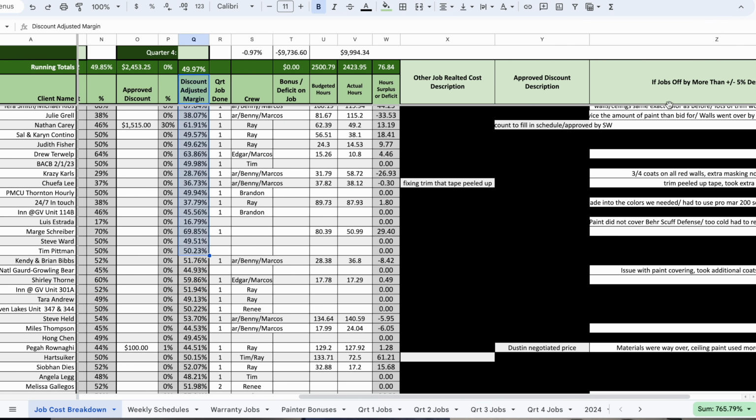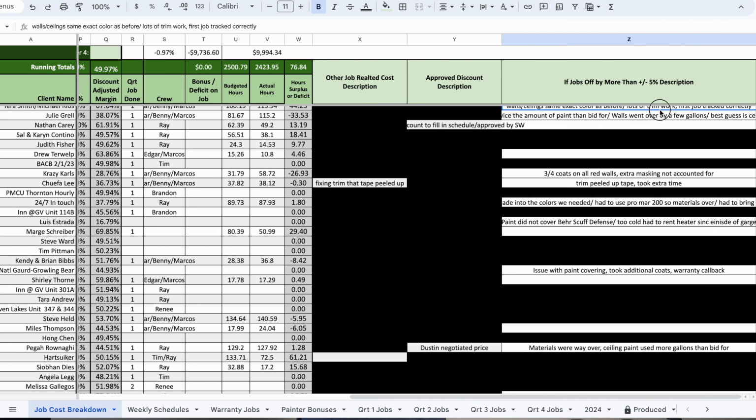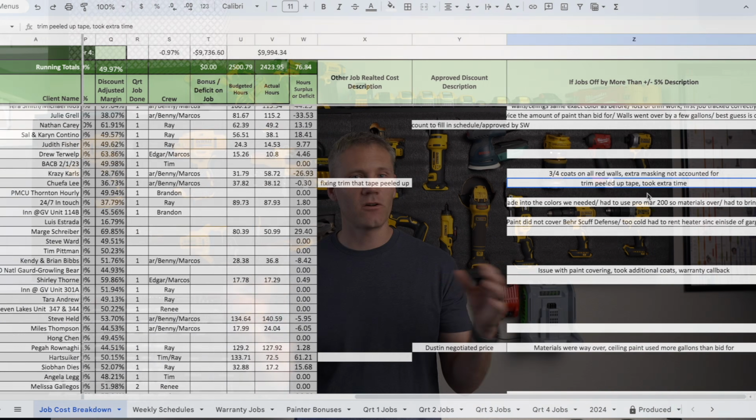And that's the key, that feedback loop of understanding why. That's when you learn, oh, painters aren't painting at the same rate. Oh, this standard isn't enough. I need to adjust it. And the reason I chose slightly below average for an experienced painter is it's just really good for whether I'm using subs or employees as a number, because for a sub, they want to be making more than the average painter. It's why they're a sub usually.